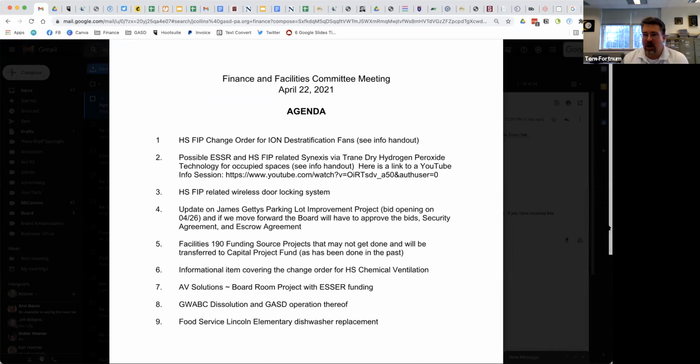There's about 6 projects right now that we have identified that we're probably not going to be able to get done, and the total amount of that is about $20,800. So sometime soon, once we're sure it's going to be those 6, we would probably come to the board and put an information item and then an approval item eventually to just move those over to capital project fund. We've done this in the past, and it's sort of an annual review that we do. Sometimes we need to do it and sometimes we don't.